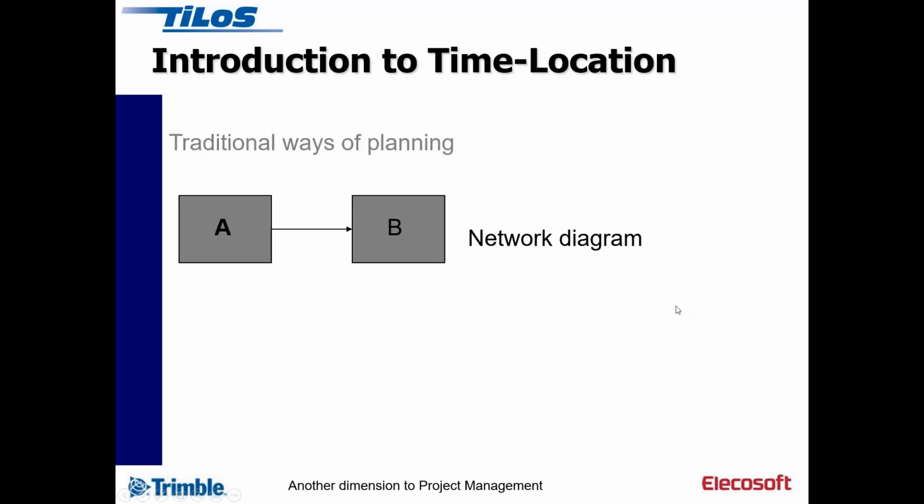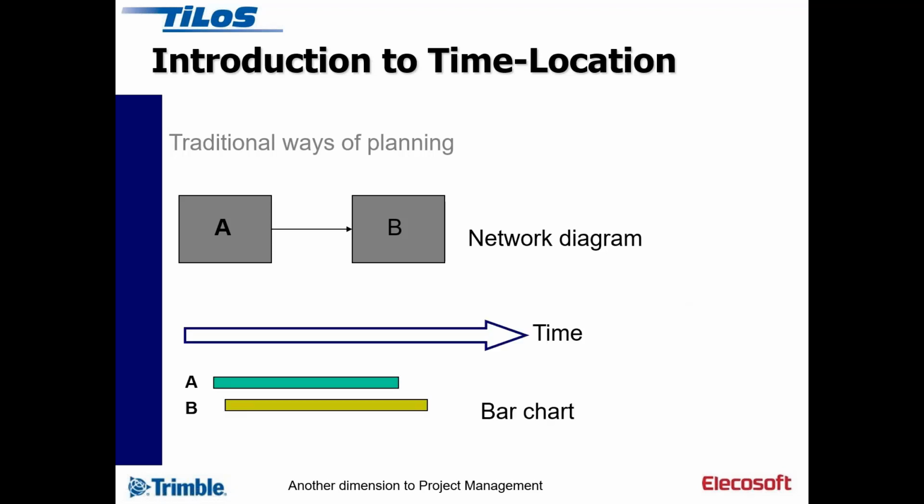So traditionally, you might be using various tools. So it might be P6, Power Project, Microsoft Project, others, where you've got two activities that you link together with logic links, and you view those in a network diagram without a timescale, but nobody really uses that because everybody is going to convey that to somebody else by displaying it against a timescale. So then you get the bar chart, the Gantt chart, and so that conveys more information. You can see that task B follows task A, both in start and in finish.